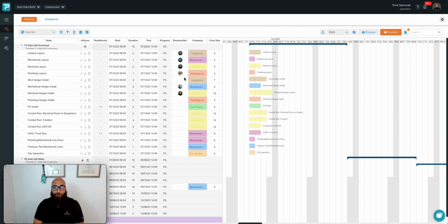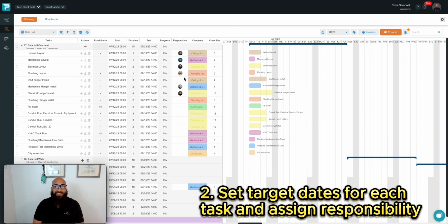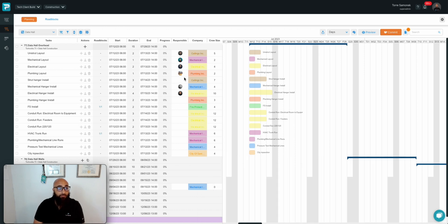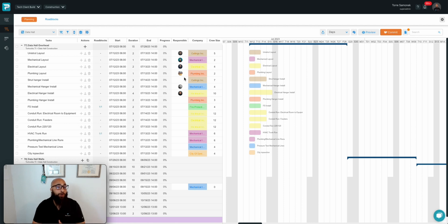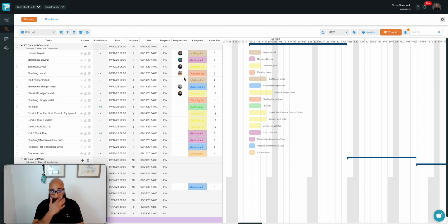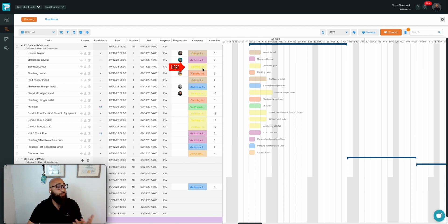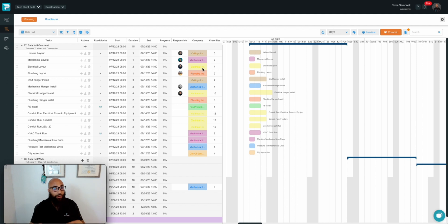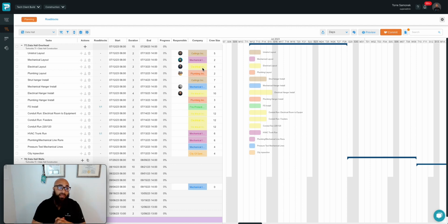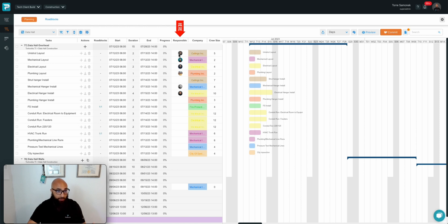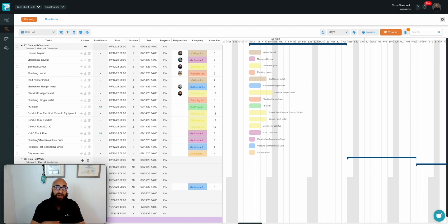Moving into step two: setting target dates for each task and assigning responsibilities. In ProPlanner, responsibilities are assigned automatically. If your trade partners are helping you build the look-ahead, their company will automatically populate beside the tasks they're working on. For instance, Unistrut Layout is owned by Sellings, Inc. Electrical Layout is owned by Electrical, Inc. We didn't have to do anything additional to get that information. It happens automatically when we bring our trade partners into the conversation.